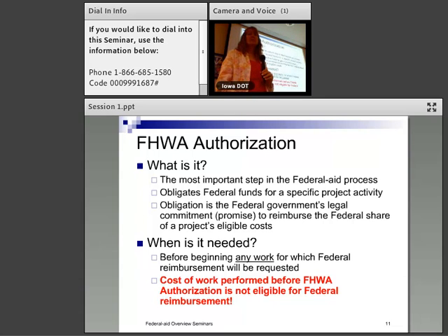You must have that federal authorization written notice from your administering office, the DOT, whomever you're working with at the DOT, whether that be a district or systems planning. You must have a written notice from them that they have gotten federal authorization before you start any work that you want reimbursed for. So don't start your project until you get that nice little letter.